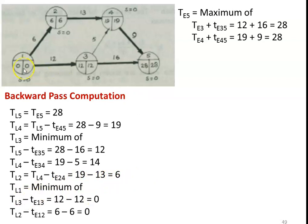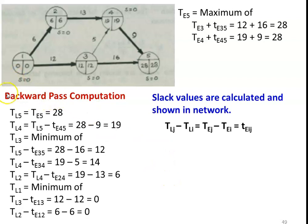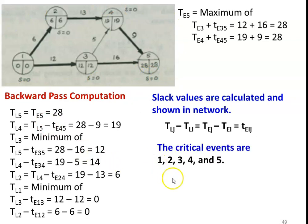TL1: with two outgoing arrows, TL1 = minimum of (TL3 - t(1,3)) = 12 - 12 = 0, and (TL2 - t(1,2)) = 6 - 6 = 0. Both are 0. Now we calculate the slack values, which are the difference between TL and TE: event 1: 0-0=0, event 2: 6-6=0, event 3: 12-12=0, event 4: 19-19=0, event 5: 28-28=0. For all events the slack value is 0, so all events are critical events: 1, 2, 3, 4, 5.